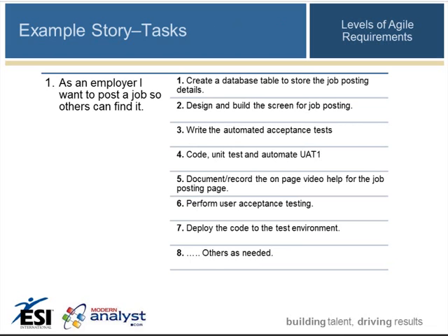While we looked at it from one perspective, from user acceptance tests, we can also turn that same user story, "As an employer, I want to post a job so others can find it," and decompose it into a series of tasks which represent the day-to-day working activities of the project team. So number 1, for example, create a database table to store the job posting detail, and working our way down through 8 or others as needed.